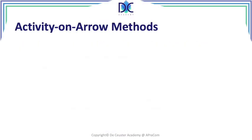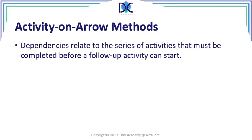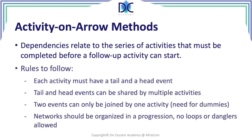When we look at the activity on arrow methods, we look at the different series of activities that must be completed before a follow-up activity can start. In the activity on arrow methods we have to take into account the following rules: every activity must have a tail and a head event — there is a start and a finish to every activity. Tail and head events can be shared by multiple activities. Two events can only be joined by one activity, and here we have the need for a dummy activity, because we can only have one activity linking two events, and in some cases we cannot represent the correct dependency relationships otherwise.